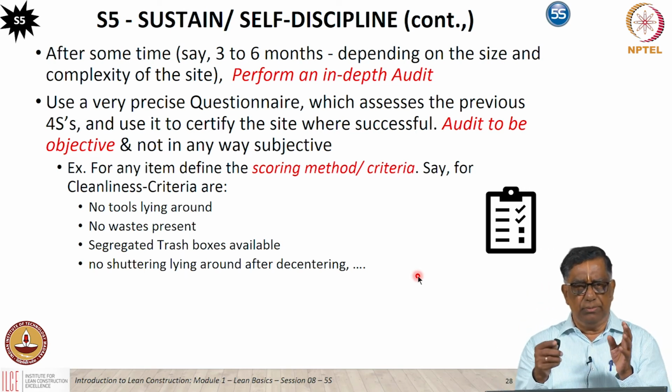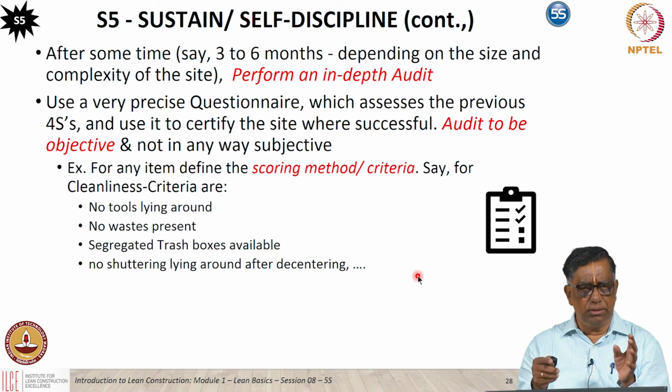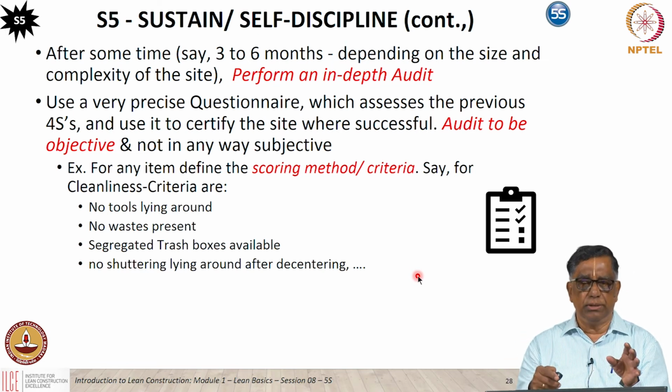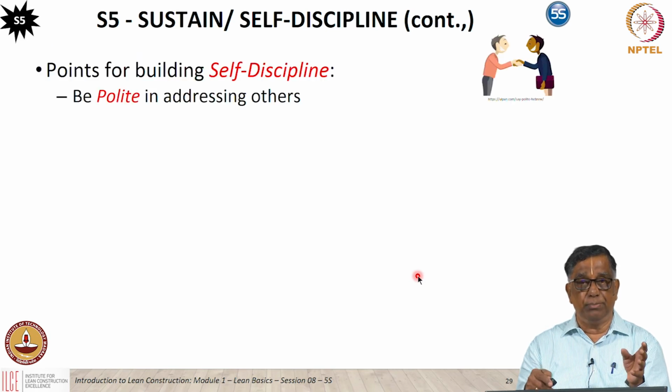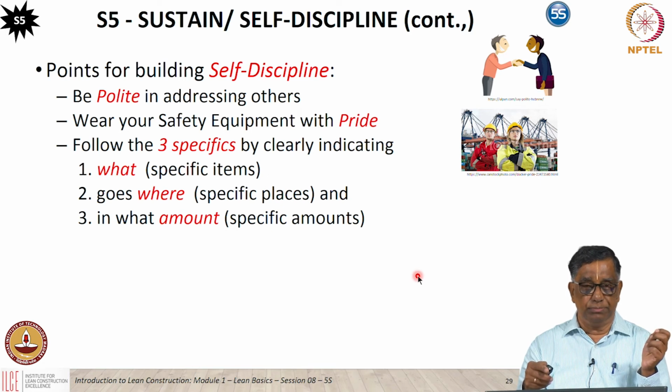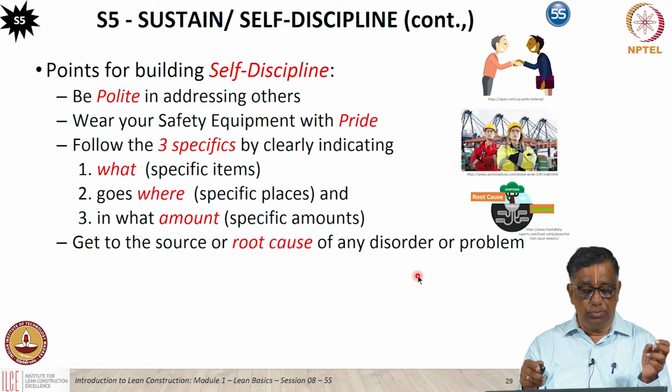So we make a questionnaire which is standard, well understood, get somebody from outside the site to come and do an audit, and then you understand what has been done properly, what has not been done properly, and then keep on improving all that. So the basic thing is that everybody understands at the site what has to be done and where the things, materials go, and in what quantities and so on.